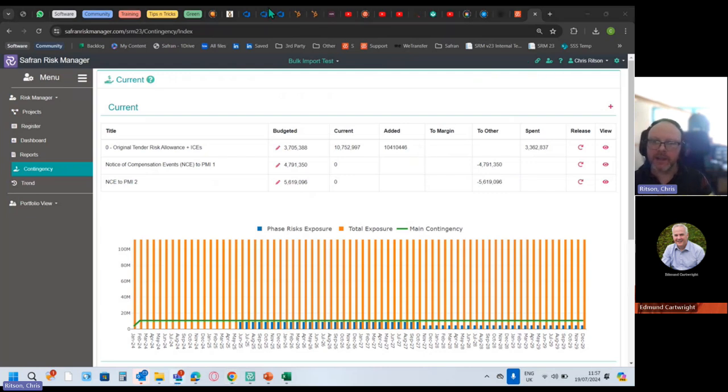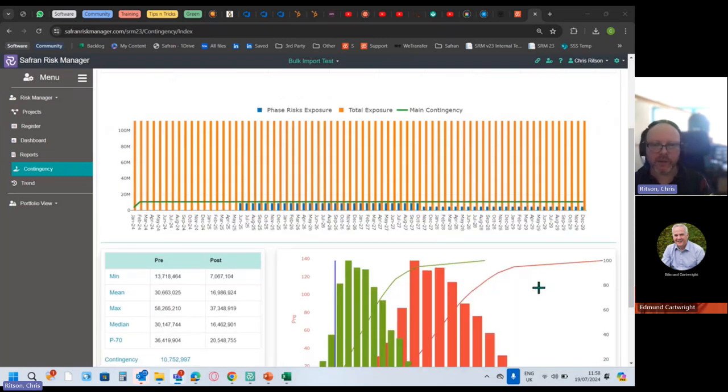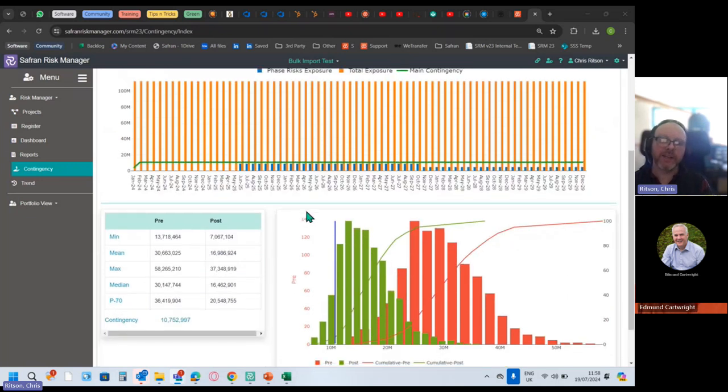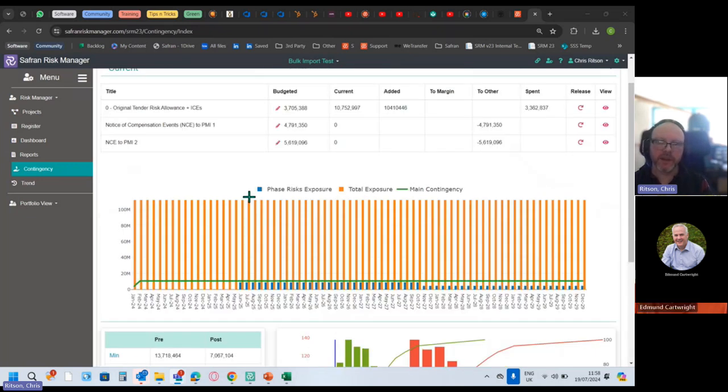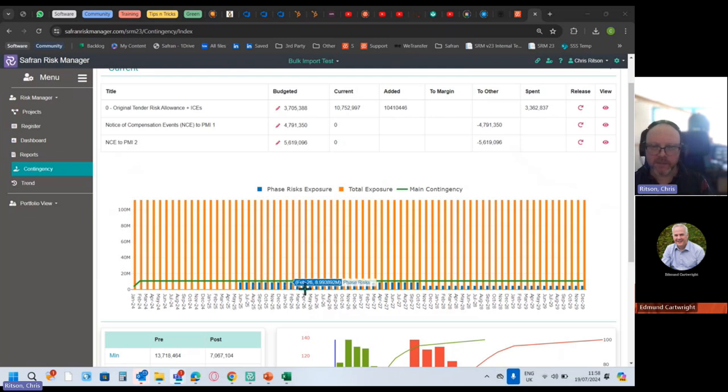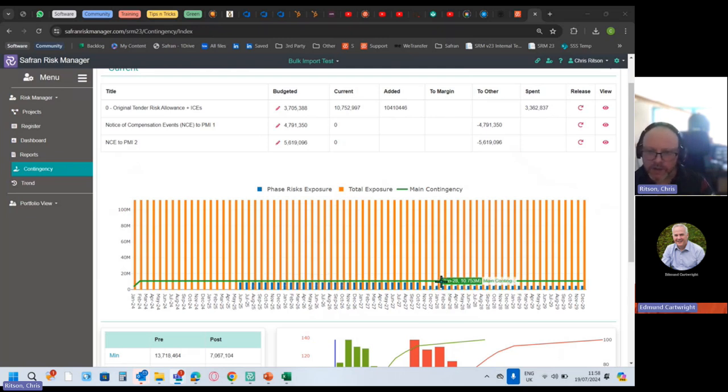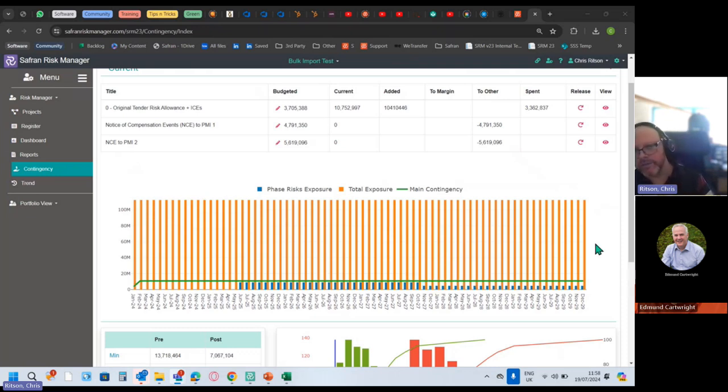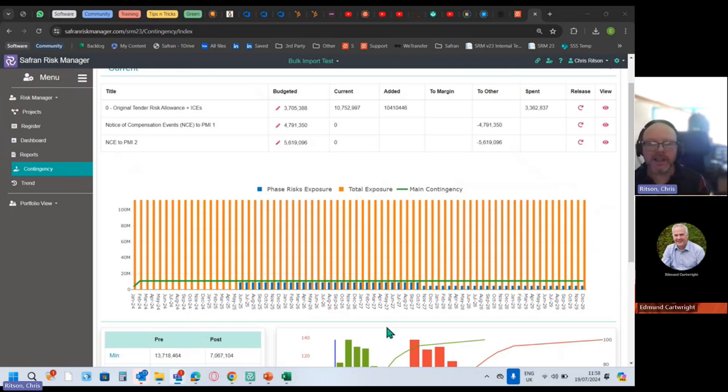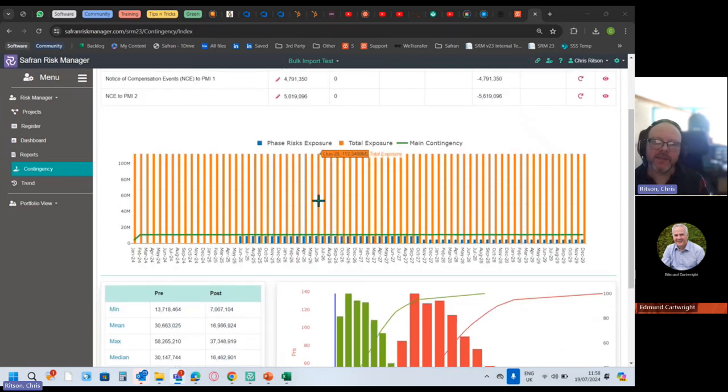This is supposed to be like a Manhattan diagram. I've probably not set this up very well just yet, but different phases of the project attract different risk exposures. The blue represents the phase, so you can see the bars are lower here, but total exposure over a very long duration project is very high. Adding all those bars together gives you the total exposure.